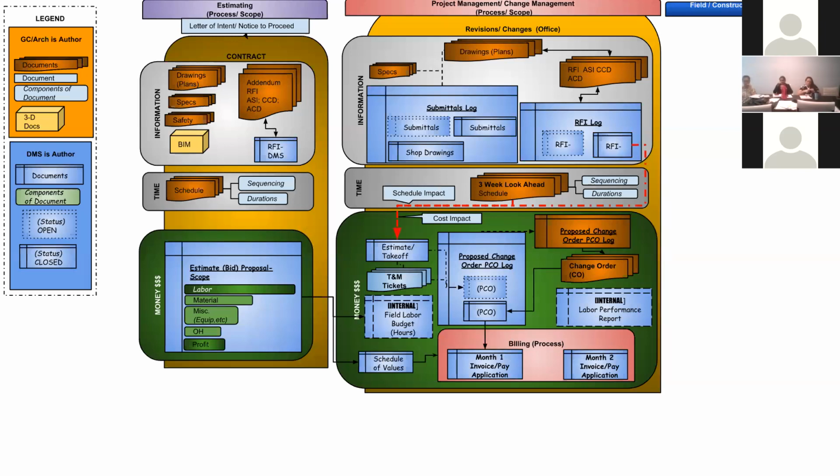If the general contractor says your price is too high, we can refuse to do the work. We can say, well, okay, then get somebody else to do it. And that allows us leverage so that we don't spend money where it's not necessary. If we continue to spend money and then we're trying to collect some of the stuff, there's a negotiation process that happens with PCOs that we may not be able to get as much money as we thought. And then that changes our financial projections.